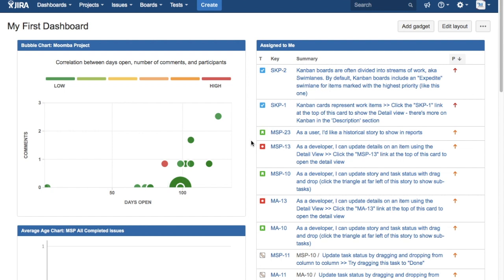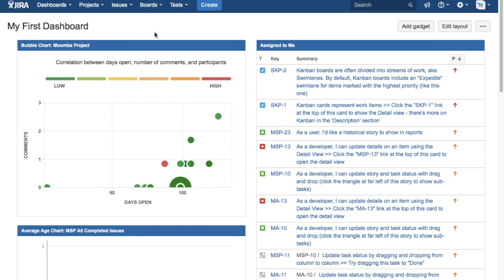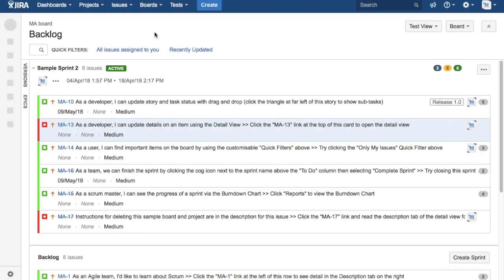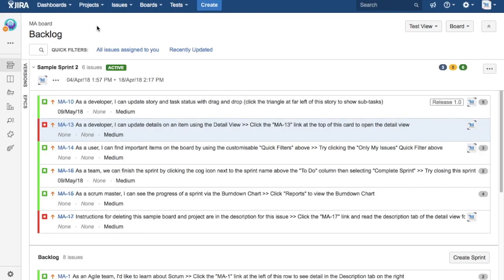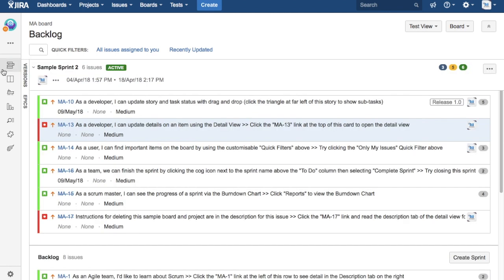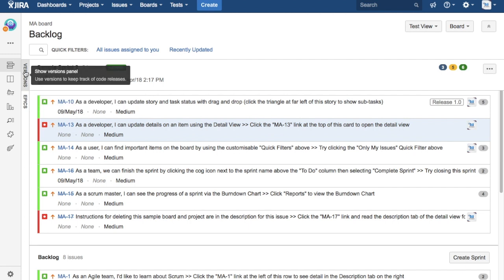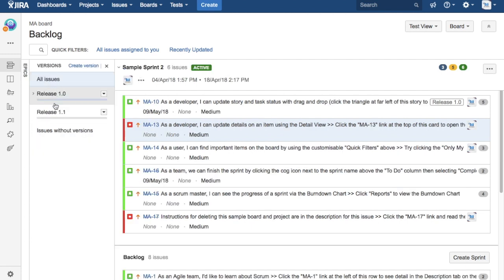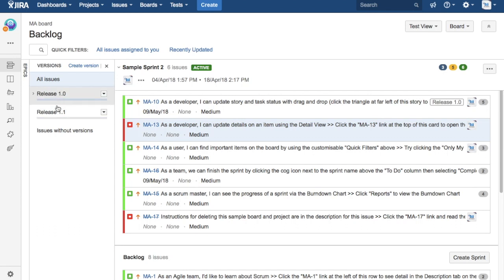To get started, just go to the board for the project in which you want to add issues to the release. I have selected the MA board. If you go to the backlog icon here, you will see versions in epic. Just click on versions and you will see the versions that have been added in that particular project.